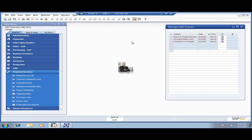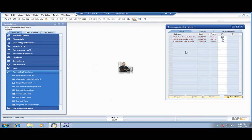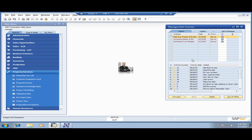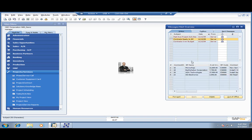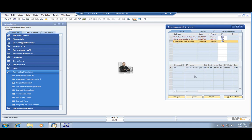The other thing we do in regards to revenue leakage is we have some alerts to keep us on track and on top of our projects. For example, we have an alert for activities that are late on projects. We've also got some contracts that are ready to be billed or invoiced — quite a bit of money sitting there that we need to collect on. We've also got a contract that looks like it's over budget. We want to follow up on this immediately with ADA Technology. We're not so concerned about the projects that are on time and on budget — we're more concerned with the ones that aren't.